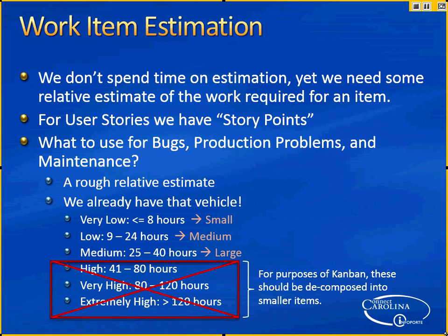But it's also possible that there's such a big infrastructure piece that it's going to take, say, 4 chunks, 4 pieces of work in process to get it done, and they're not all going in at the same time. So they'll get into that release bucket, but they won't be released until they're all there. They'll be in the done column, but not deployed. Correct.